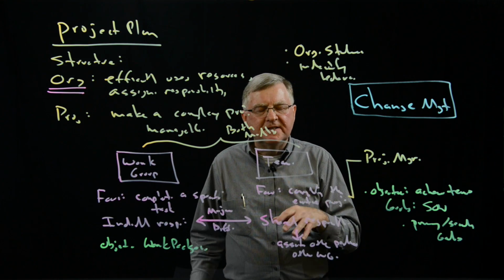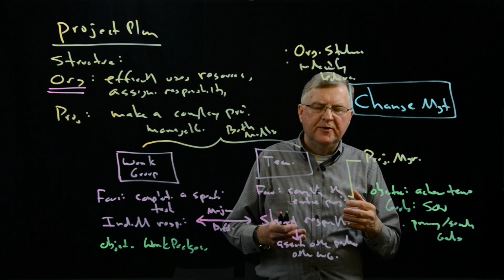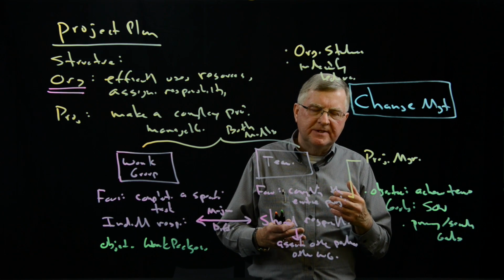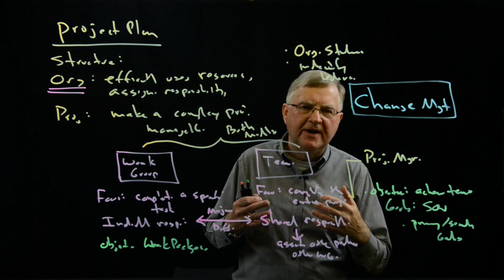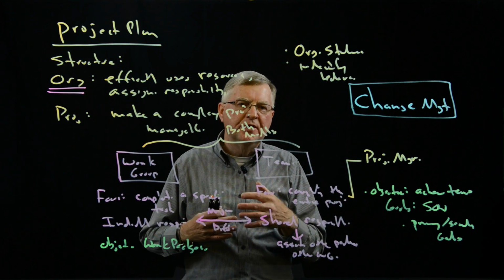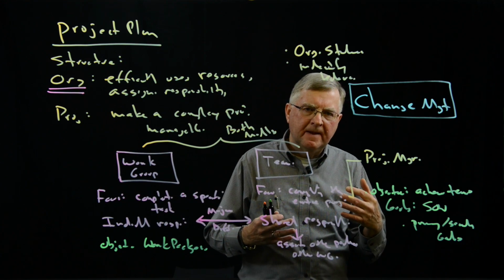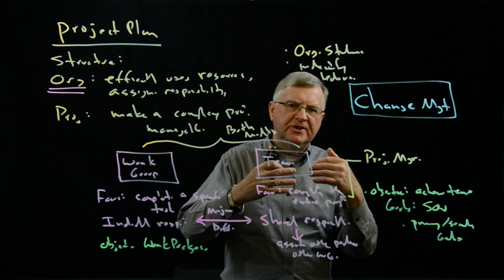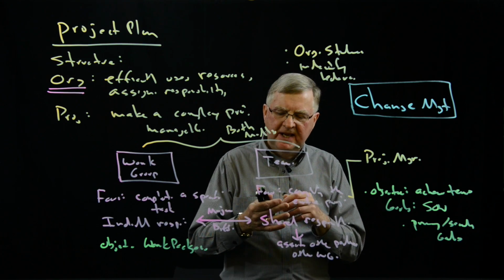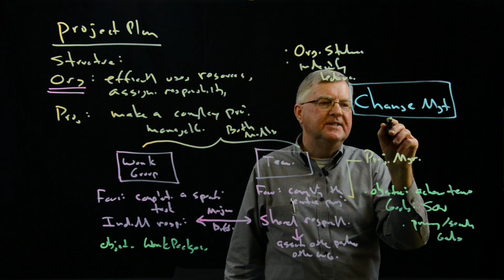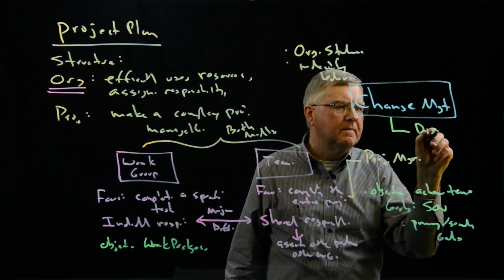Because our project is very dynamic. We're going to encounter unanticipated problems. Events are going to occur that change our plan, to cause us to reallocate resources or to do things somewhat differently. And it's okay to change the plan in response to those unanticipated events, as long as the change is done in a disciplined way.